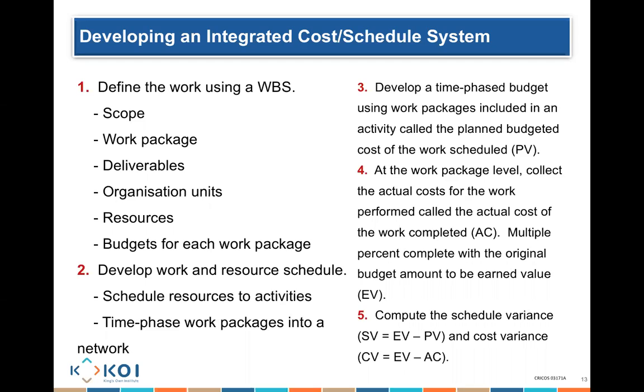When I calculate my actual cost, my planned value, and my earned value, then and only then will I be able to start making the comparison. I calculate my schedule variance, calculate my cost variance, and find out whether things are progressing well or whether they are not progressing in the most appropriate manner.